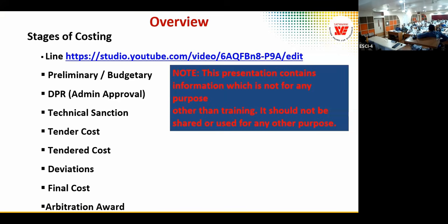The IAS officer was pressurizing us to bring down the DPR to 600 crores, though we know it is 1,000 crores. They felt that if we approve the practical cost of 1,000 crores with market conditions, contractors will quote above that. So we had to tone down our technical sanction and DPR to 600 crores.